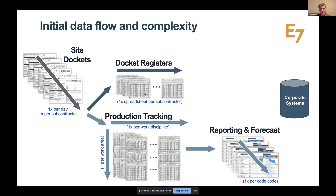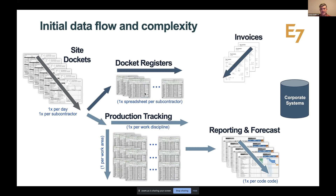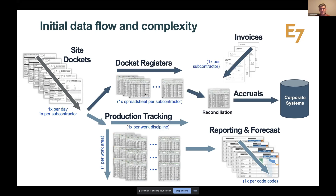The dockets also went through the finance team as a record of all subcontractor work — quite an onerous process, because at end-of-month invoicing, they had to be reconciled to generate accruals that fed into the corporate finance system. E7 takes a different approach: we capture data on a daily basis.